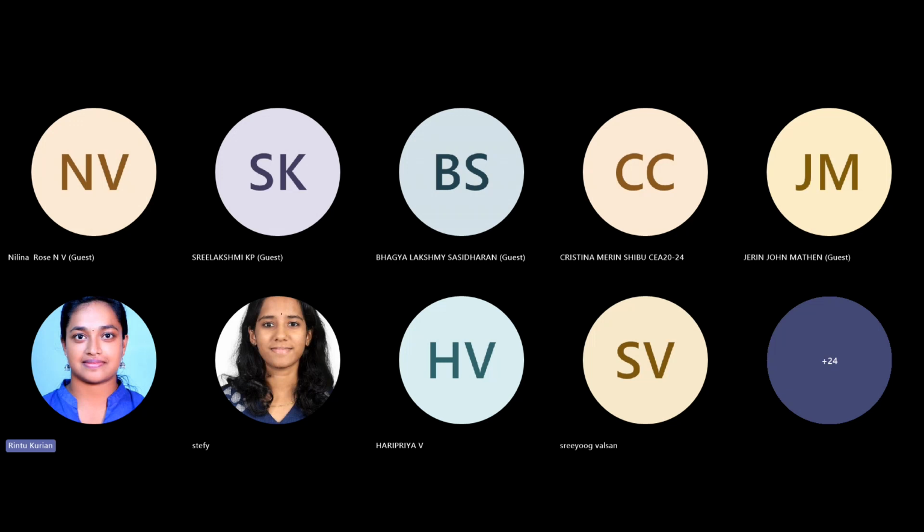50 to 70 in between ranges, depending on the person you are approaching, or even the person who you are intending to sell, and the quantity of steel you are trying to sell. That doesn't mean that you're getting back what you're spending. You're spending 90 rupees, and you are not able to get even half of it back because of the wastage. So it's better you plan the usage of steel, so that you can cut down the budget and even keep your budget from overboarding. Okay.